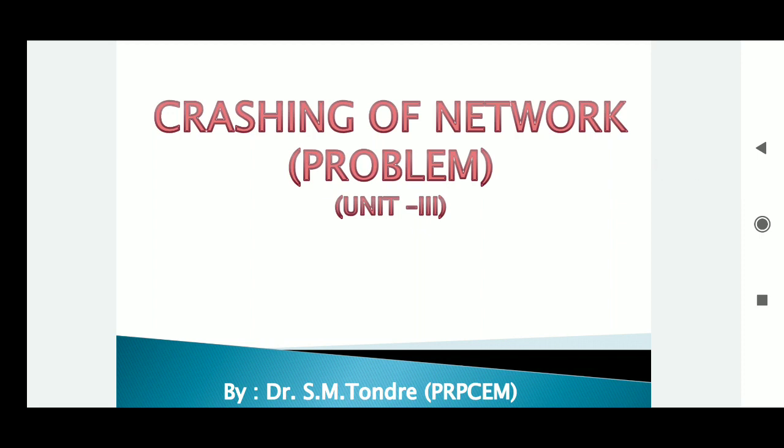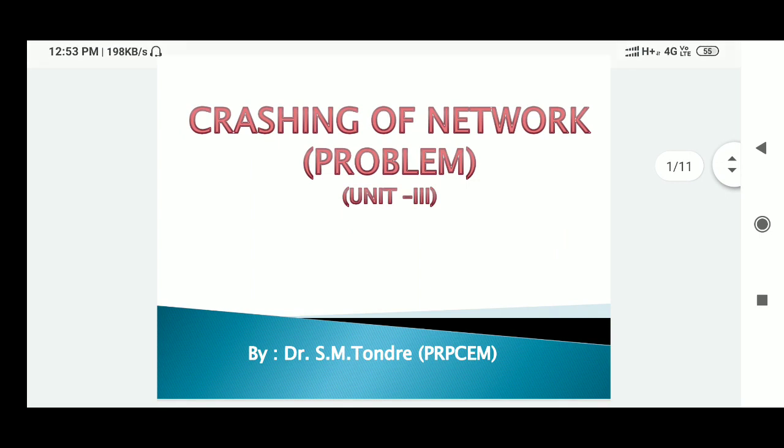If it is an emergency that the project should be completed before the estimated date, then crashing is nothing but reducing the time duration of the project by employing more resources, that we can utilize to complete that project before the scheduled date.